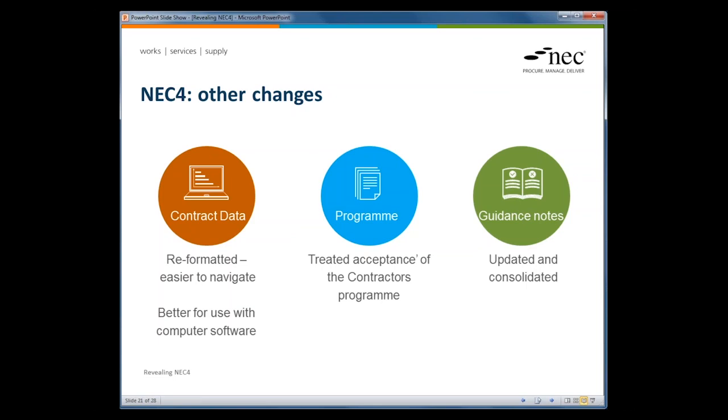Yes, the starting point was to look at what we have and to recognise that it's a little bit created on an ad hoc basis as and when needed. What we wanted to do was to take a completely radical look and to structure them in a different way. So we start off with the first thing, which is the client deciding what precisely contract they want and what elements they want to put into that contract, how they want the contract to be organised. So there's a procurement strategy, and the contract strategy will start as volume 1 of the guidance. So a complete set there dealing with all the contracts, giving you guidance as to how to choose between them and how to decide which part options you might want.